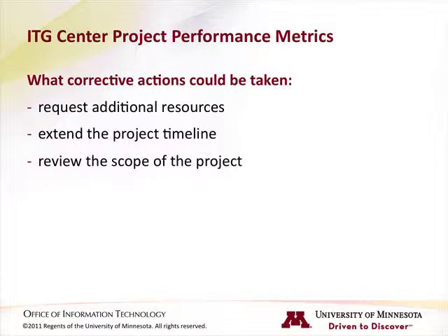What about the scope of the project? Are there any areas where things can be moved out of scope, deferred, or reduced in scope, especially if the project due dates cannot be moved? Jane has considered her options and she has requested and received additional resources to get the project back on track.